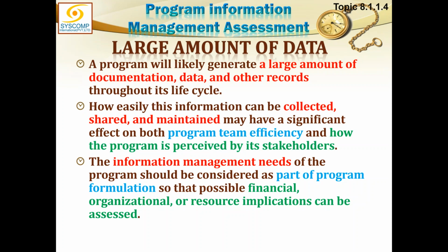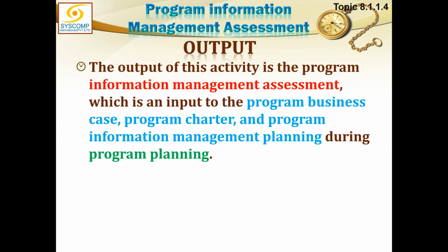The information management needs of the program should be considered as part of program formulation so that possible financial, organizational, or resource implications can be assessed. Output of this activity is the program information management assessment, which is an input to the program business case, program charter, program information management plan, etc.